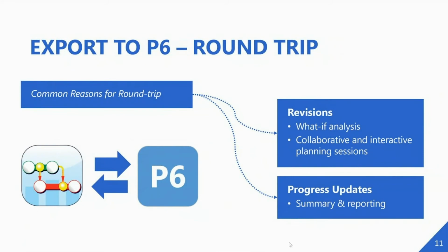Common reasons to do a round trip are that you might want to do a what-if analysis in NetPoint and then import the changes or your selected alternative back into your P6 database. You want to update your P6 database with the selected alternative, or you might just want to do collaborative and interactive planning sessions and thereafter push the updates back into your P6 schedules from those sessions. You might also want to do progress updates for summary and reporting purposes, and for that you need a round trip.